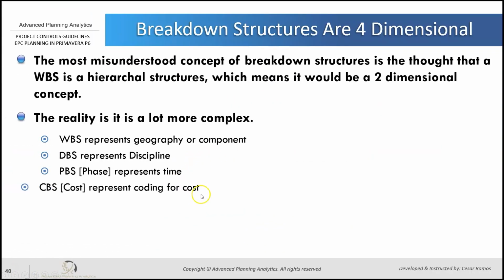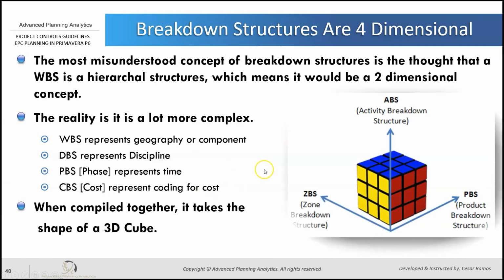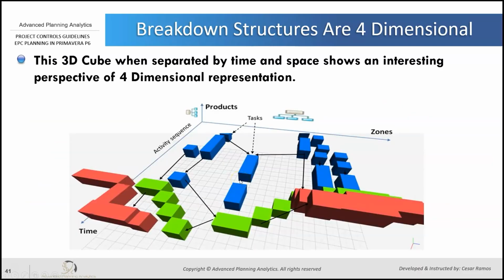If we end up going a little bit further, which I won't in this video, and talk about four-dimensional space. So when you hear 4D planning, that is when they're actually tagging those pieces of work over time. So usually the schedule works with the tagging itself with the model, and then you can track the assembly of those pieces in a four-dimensional space, which is time. So 3D plus time is your 4D planning.